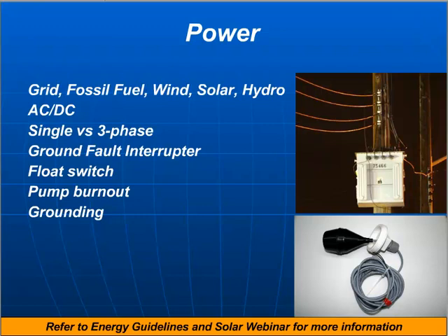The other key piece of a pump, for an electric pump in particular, whether you're also involving wind or solar or hydro, is that you're eventually converting it to electricity, so you need some sort of electric design. I think this is one thing that chapters overlook until they get to the final TAC presentation. But you really need to understand the wiring. I'm not an electrical engineer by any means, so I wouldn't be qualified to do an electric design for a pump. But it seems that a lot of times people pick a pump, they know the pump vendor they're going to use, and it's just going to be installed, and that's all the information that's provided.